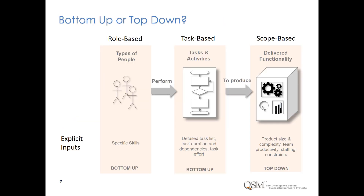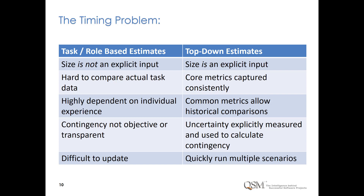Estimation falls into two broad categories. Bottom-up estimates decompose all the work required to build the product into a detailed task list, estimate duration and effort for each task, then sum task estimates to produce overall schedule, cost, and effort. This requires detailed knowledge that we may not have. For early estimates, detailed task or role-based estimates suffer from a mismatch between the data available and the data required to create a detailed task list. These kinds of estimates are closer to planning than upfront estimation, and a high level of detail makes them difficult to revise and update when the landscape changes.